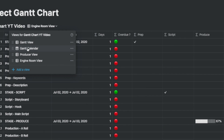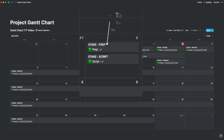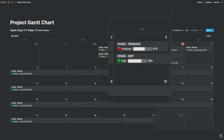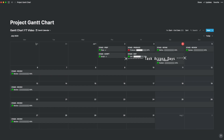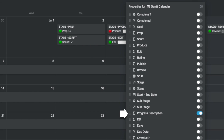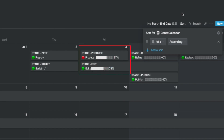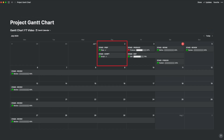Let's add the standard calendar view within Add a View — and this is what you will see. I call this the Gantt calendar. Rather than seeing it as a long horizontal table, you see it as a Gantt view every month. The red dot signifies today's date. The task is shown in capital letters. The overdue status is shown by a green or red dot as the case may be. The progress bar and stage are shown along the same lines. If a task cuts across days, you can visualize this quickly. For example, prep and script are only for July 2, but edit is across two days and review is till the end of the month. The only thing you need to do is show the progress description column set up earlier, and the rest of the columns remain hidden. We have sorted this on the serial number so that produce comes on top and edit at the bottom, similar to prep coming before script.